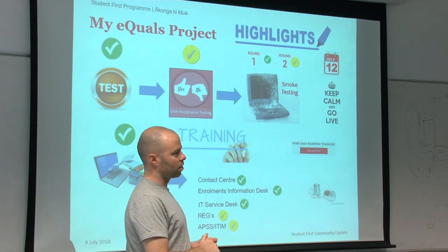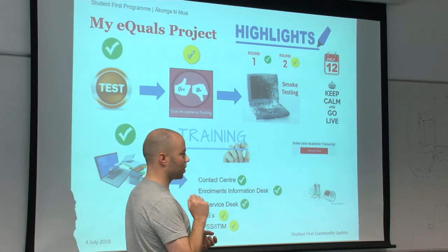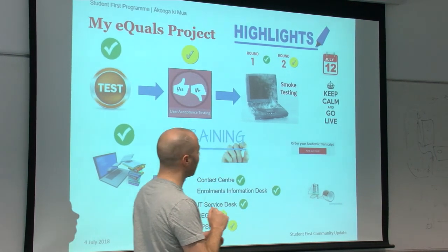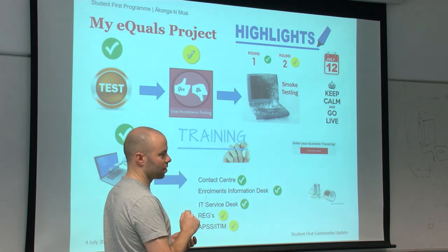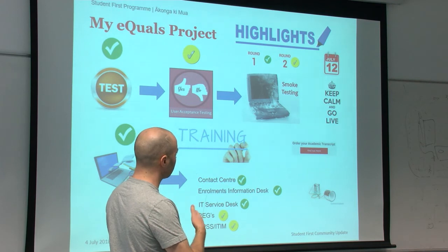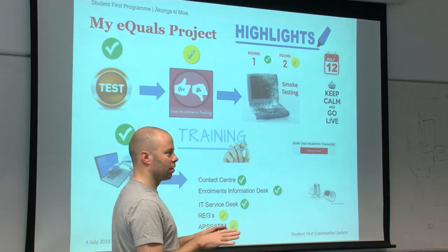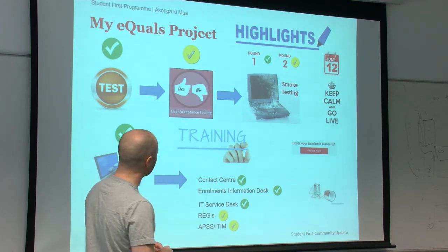We'll have productionised just about everything anyway, so we'll flick a couple of switches, repoint a server, put some stuff on the web, and it will be live. But theoretically we could probably even start putting stuff out before then. So it's an approach that de-risks things, so we don't do a big bang on go live and then find out there are problems.